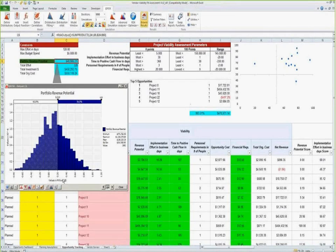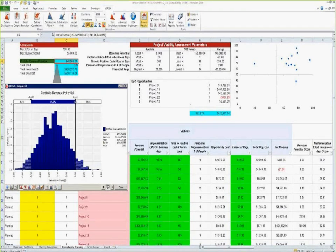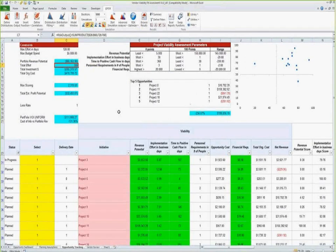And the total effort, if we state that our total effort is at 120 days. One of the other reasons why you would have projects that were not selected is just that you didn't have the organizational bandwidth or capacity to do all of them. At 120, 100% of this portfolio was unachievable, at least in this capacity. So we need to filter through. To come back to the point of let the flowers bloom, this is what it looks like. Obviously, this doesn't work.